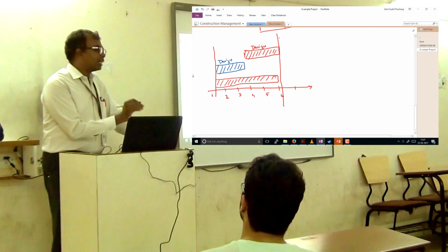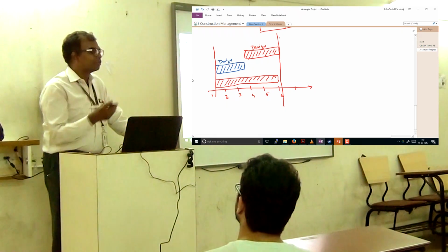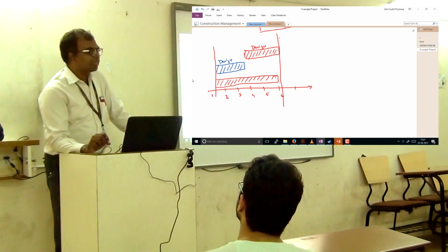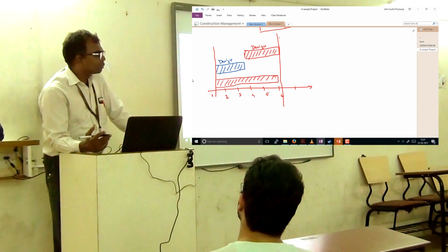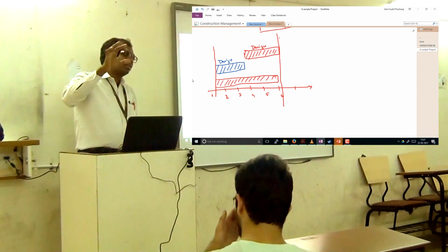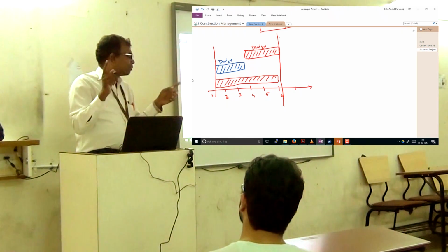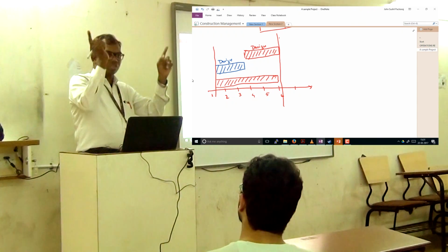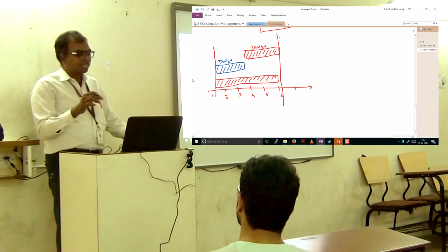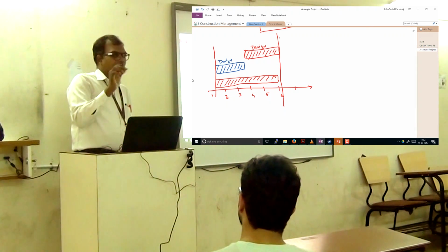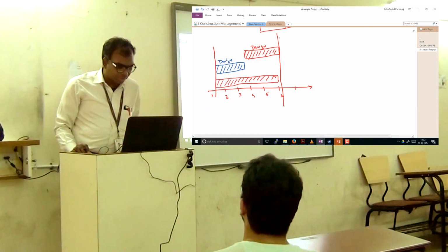So this is where your judgment comes into the picture. For instance, if I were addressing a classroom of civil engineering students, a resource like bar benders is very important, because only after they do the reinforcement rods can you pour your concrete. You need those resources, but you will not be able to play around too much with them. So here in this case also I am keeping it in that particular fashion.